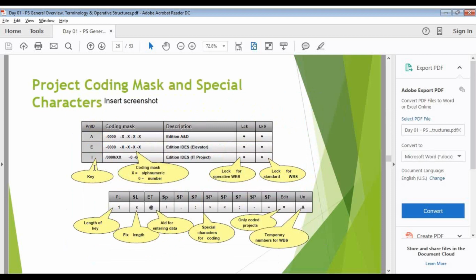Normally, you might be using some very typical names, WBS for different investment projects, or for customer projects it will be a different name. You might have come across those. Whenever you use WBS account assignments in your SD, you might have observed they have a very unique fashion. They start with the first four alpha characters, and the next three will be numeric, with a dot in between. Yes. You might have found the nomenclature of WBS in a very unique way. Correct. Whatever WBS you use, they will be in the same fashion. The number of characters will be the same, first there will be four alpha characters, and again numerical comes, or the sequence will be the same. For all the WBS used, the sequence is defined here in the project coding mask.